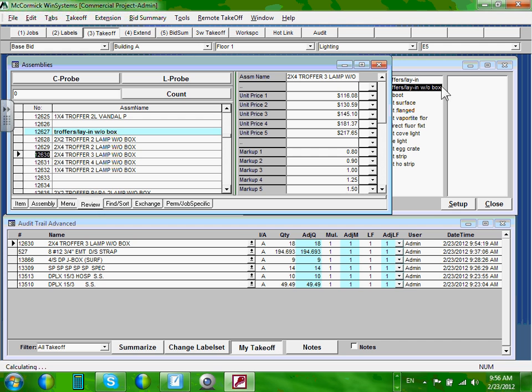Okay, now do me a favor. I'm going to go right under the price, number one. Can you guys see we say each? CMX. I'm going to say Q. Anybody knows why Q? Q stands for coated material. When you click on Q, what happened to the price number one? Zero. You have just zeroed price number one. Meaning, take this fixture as labor only and don't take it as material.